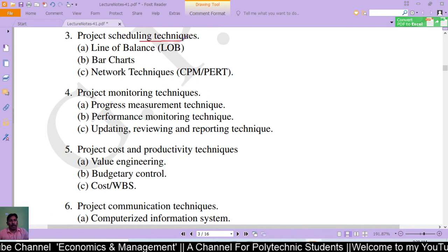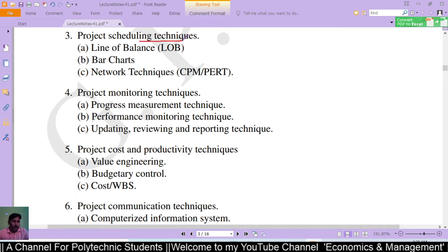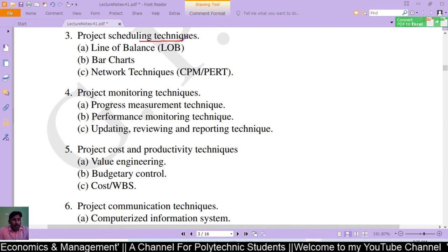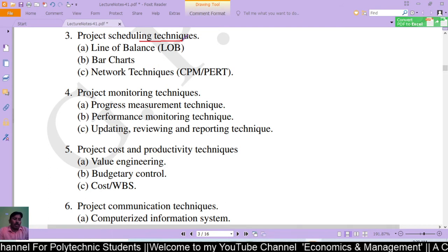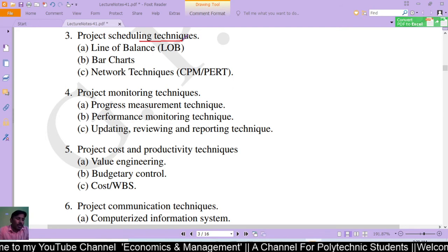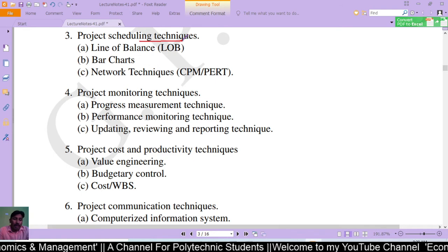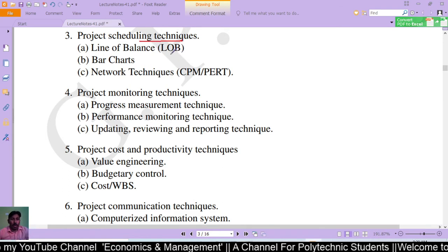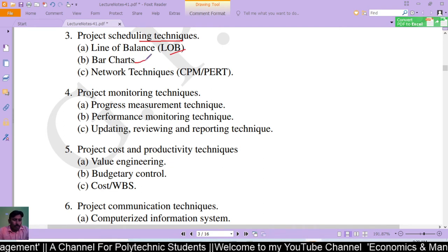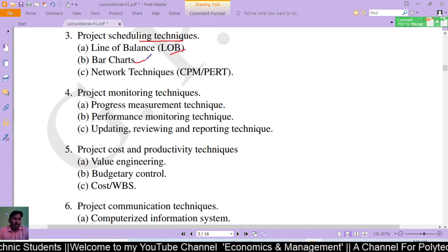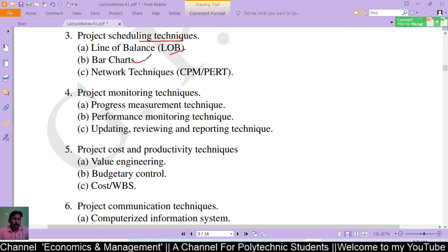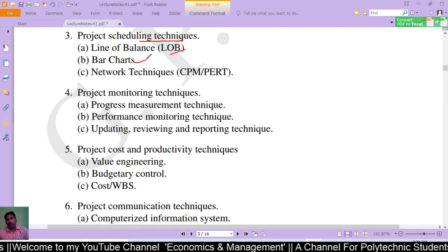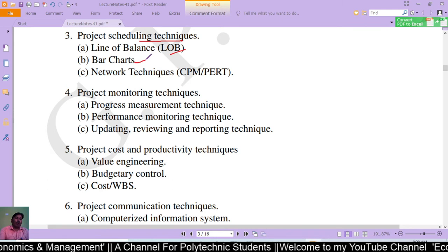The third category is project scheduling techniques, which includes line of balance, bar chart, and network techniques. Line of balance is a management control process used in construction where the project contains bags of repetitive work activities, such as roads, pipelines, tunnels, railways, and high-rise buildings. Bar chart is used for representation of a project in which activities are represented by horizontal segments whose length is proportional to the time necessary to complete the task.